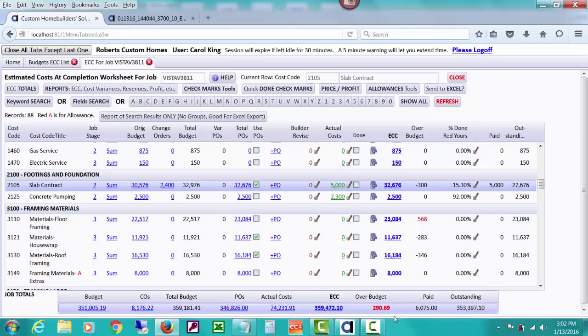Now we're under by 300. That's really a difference of 600. So that's what happens either if you issue higher or if you issue lower. You can tell what happens if you do a change order: the estimated cost gets added.